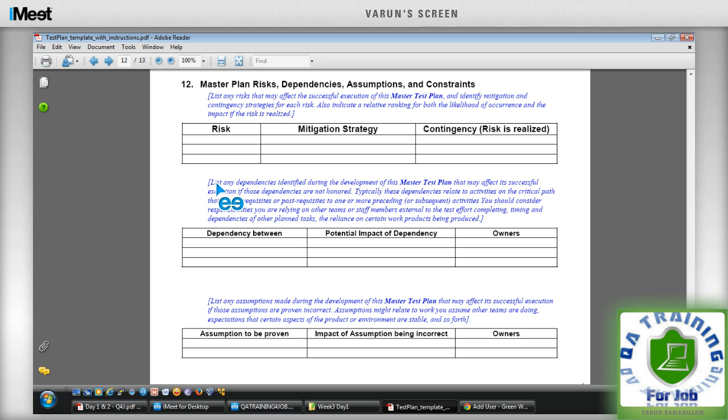That means exactly as I showed you, the version number. He has to update the document and add the version details there. But to update the document, somebody has to give him approval. Everyone has to tell him, okay, you can go ahead and do it. Otherwise, he will not be able to do it. That is a change management process. You can't just directly go and change it.